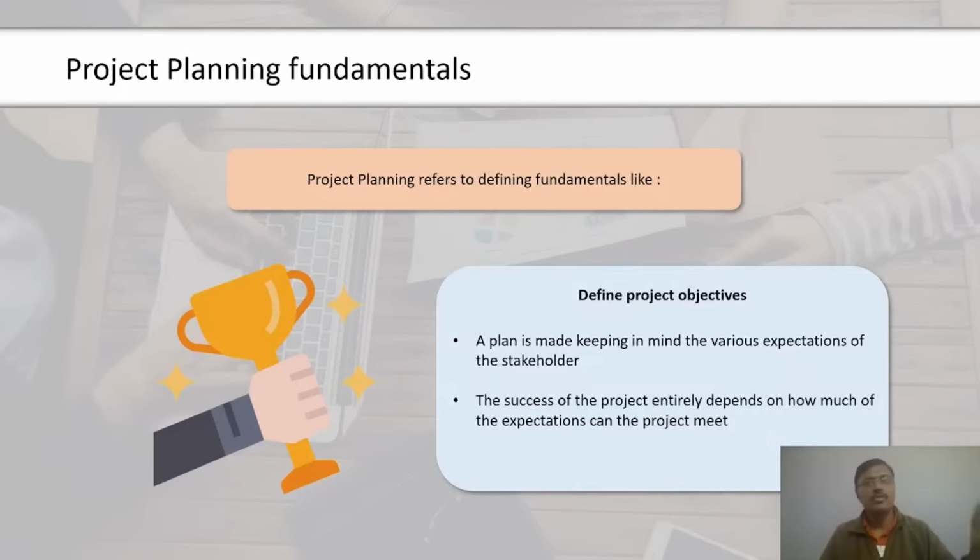The duration estimation should be done by someone who is familiar with the project. For example, the same activity, if done by a high-skilled resource, would take less time compared to a less-skilled resource. This may vary regardless of the resource used due to the project requirements. In addition, the activity duration estimation should be updated continuously as you move ahead with the project, because as the project progresses, there will be more clarity on the project.